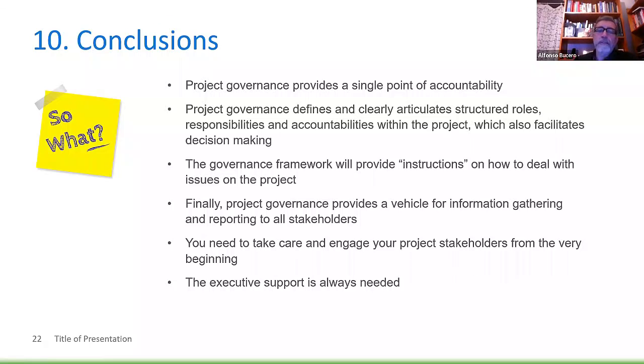And one of the things that I do when I am running lessons learned after every stage or every phase in the project I manage is to get feedback from all the people regarding whether the instructions were applicable, whether they were valid, and whether they were creating some obstacles or generating some things that need to be overcome along the project life cycle.